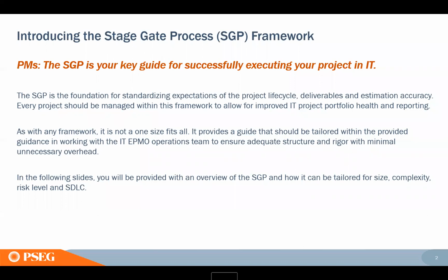So when you're thinking about putting your plan together, your plan should be focused on these stages, these deliverables, and then the activities that it takes to get through each stage. And some of the things in the checklist at the bottom you'll see are actually activities. And again, we realize this is not one size fits all. So we do give some guidelines as well as how to tailor, and they depend on two things. One is what SDLC are you using? Is it waterfall?